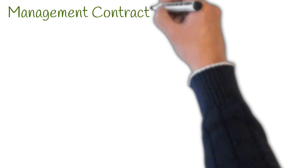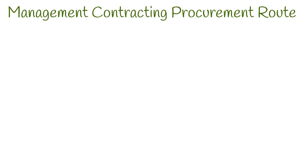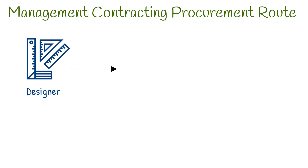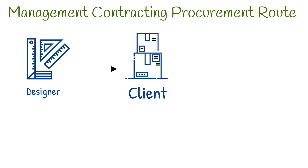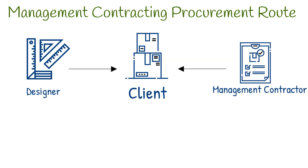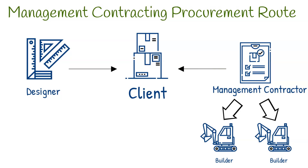Moving on, we have management contracting. Similarly to traditional route, the design is carried out by a professional team appointed by the employer. However, under management contracting, the employer also appoints a management contractor to manage the construction works. The management contractor does not carry out any of the works themselves; however, they engage a series of subcontractors who they manage and coordinate. They are paid an agreed fee and reimbursed for the cost incurred to manage the subcontractors.